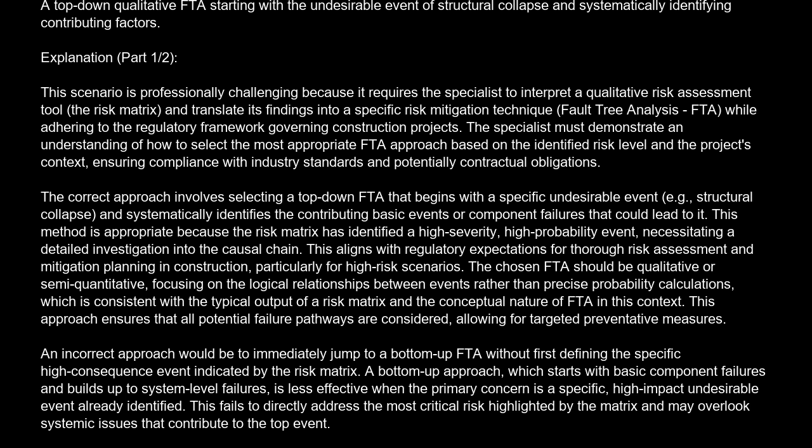An incorrect approach would be to immediately jump to a bottom-up FTA, without first defining the specific high-consequence event indicated by the risk matrix. A bottom-up approach, which starts with basic component failures and builds up to system-level failures, is less effective when the primary concern is a specific, high-impact undesirable event already identified. This fails to directly address the most critical risk highlighted by the matrix and may overlook systemic issues that contribute